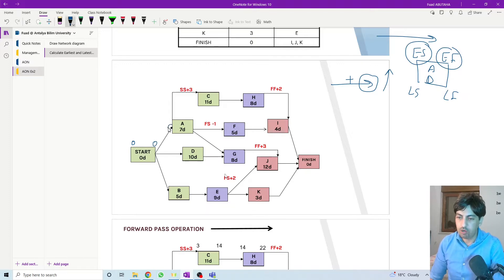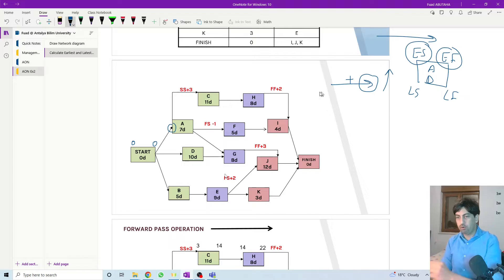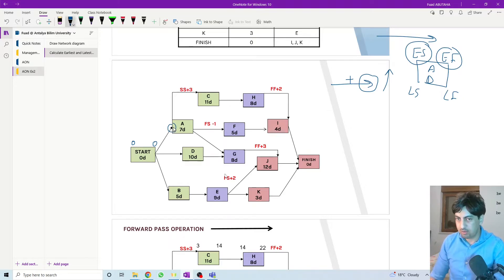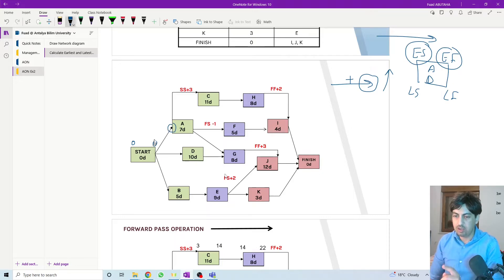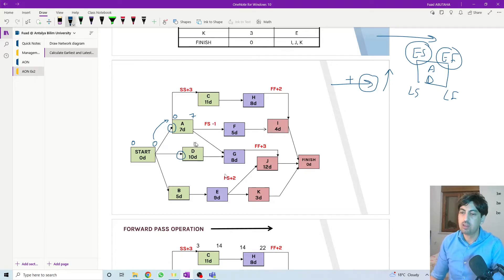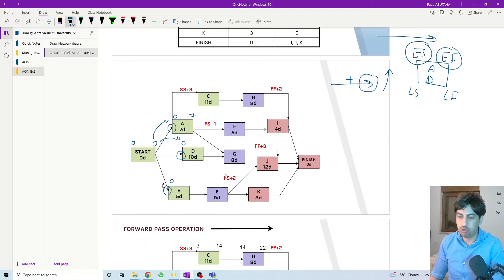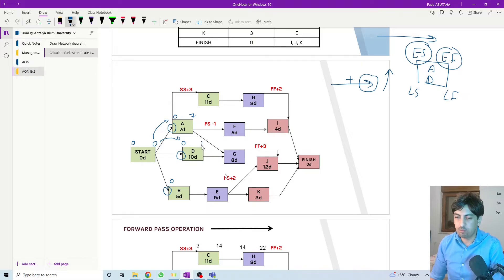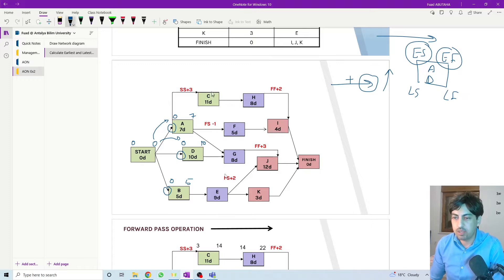We start from zero. For activity A we look at the arrowheads moving forward — we only have one head, meaning one option, so we transfer zero. Zero plus seven equals seven. For activity D we have only one head, so we transfer zero. For activity P we also have only one option — zero plus ten equals ten; zero plus five equals five.